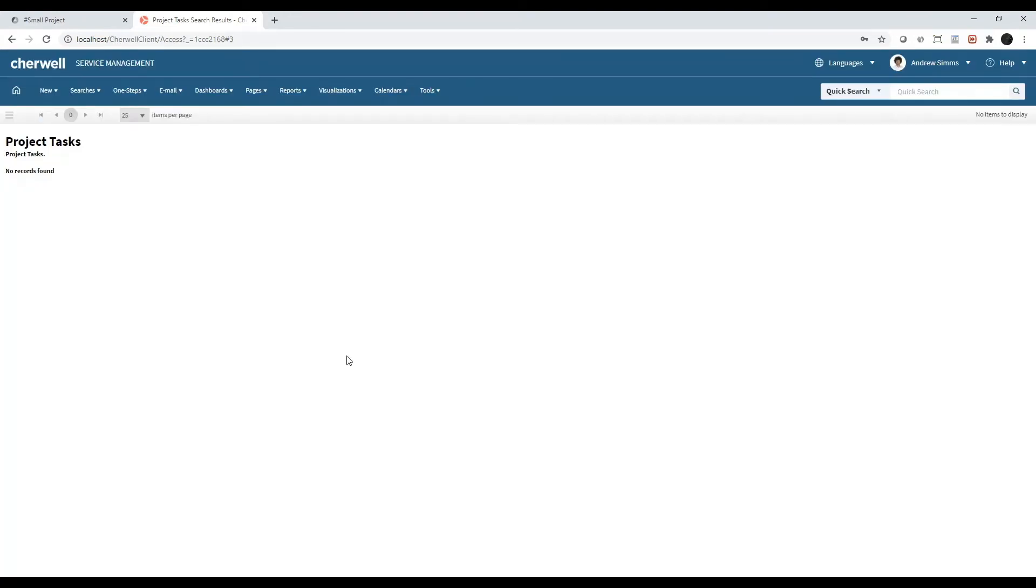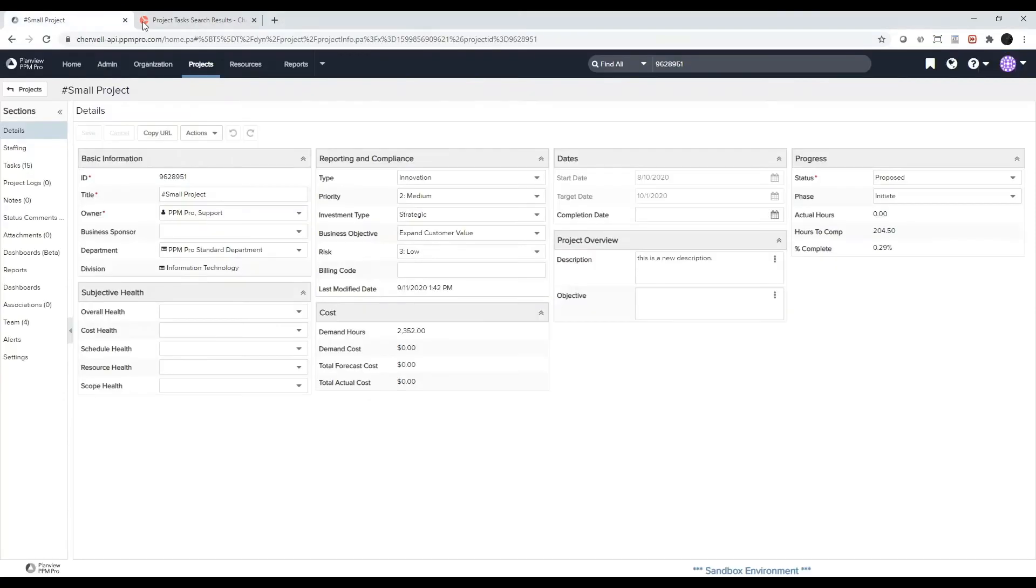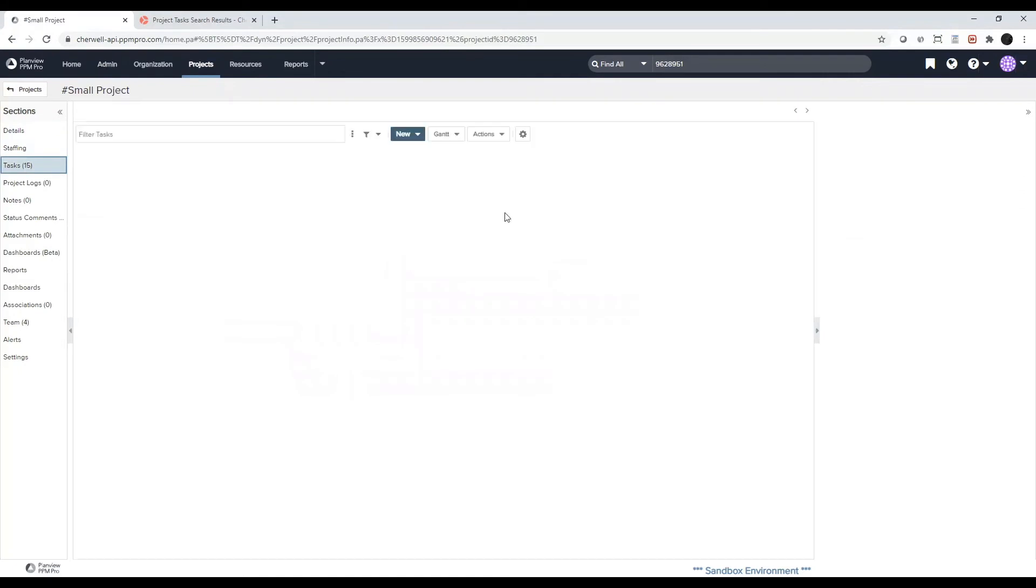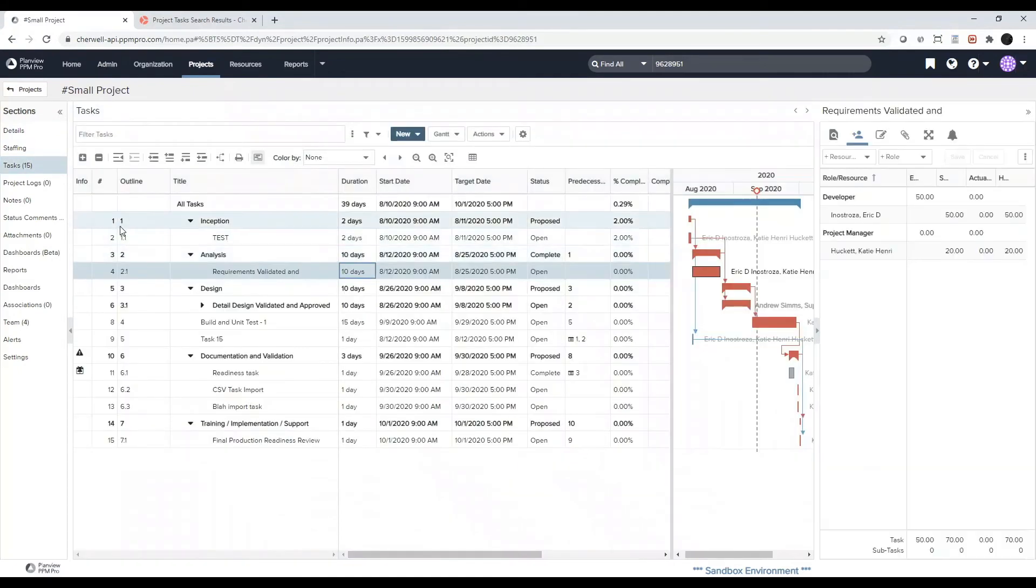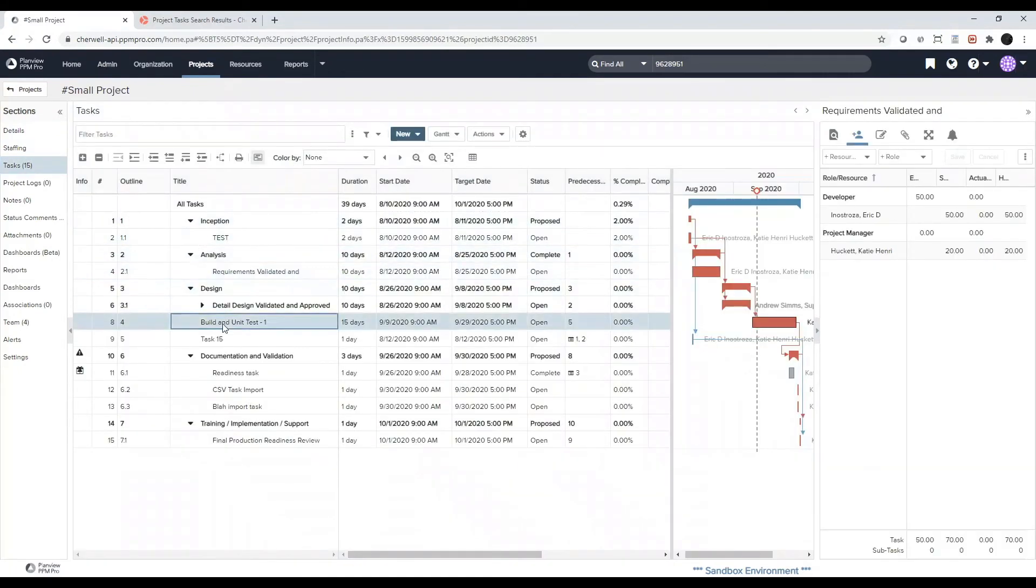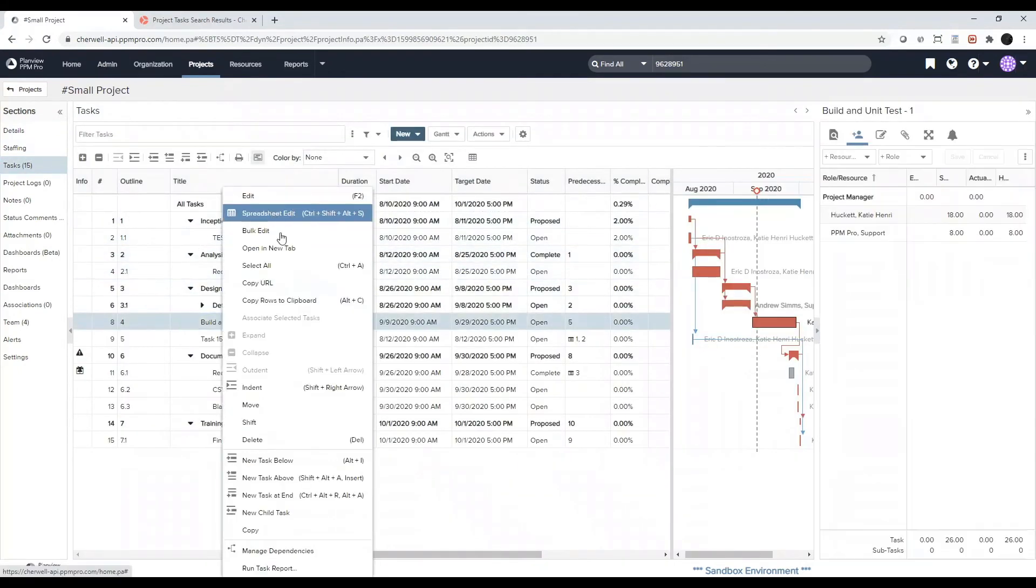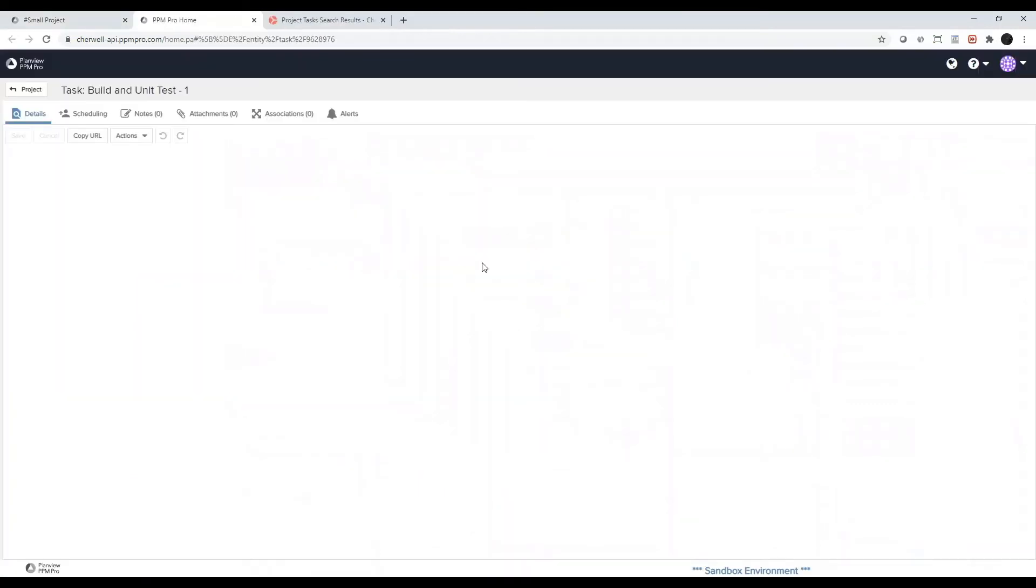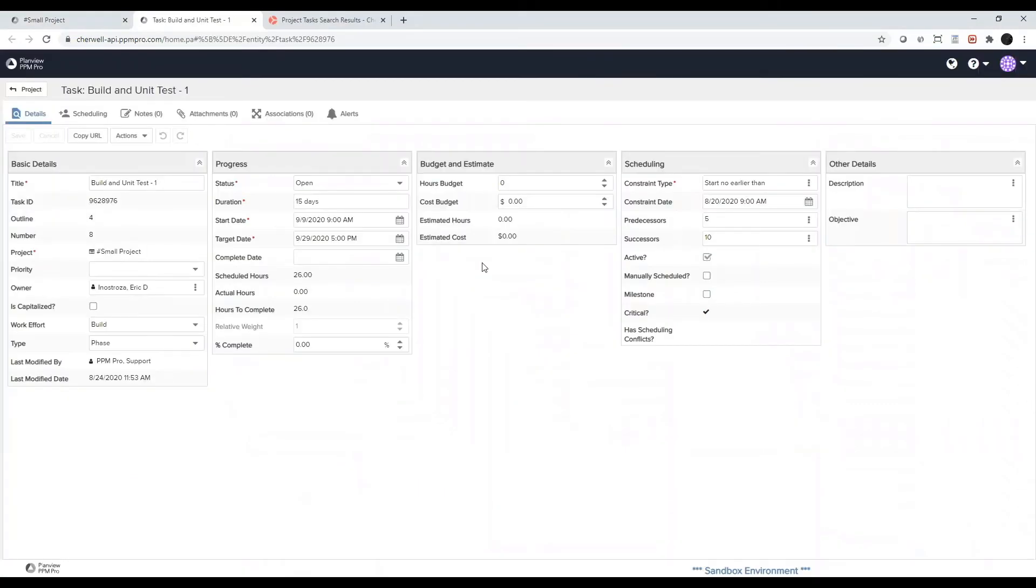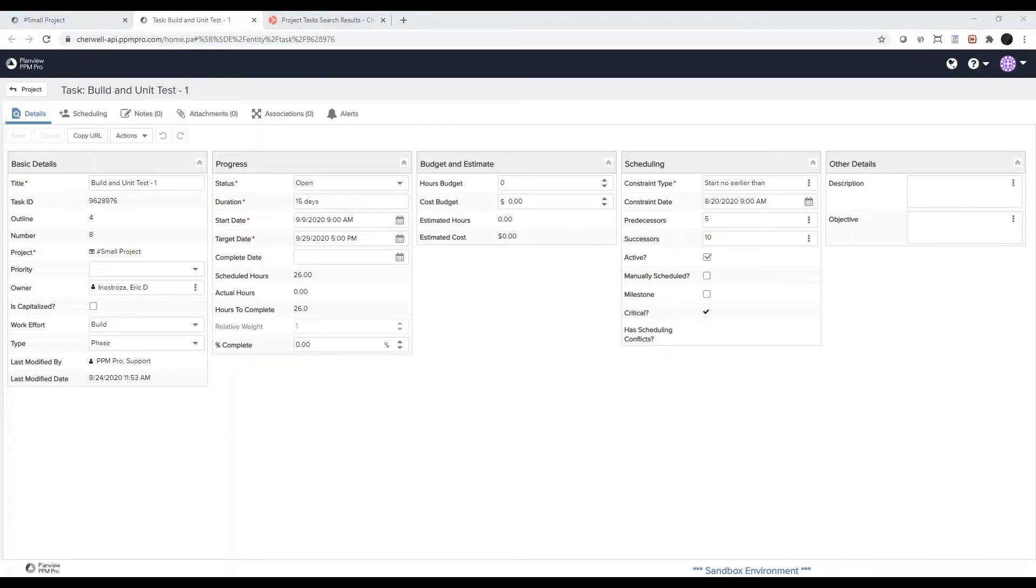There are other filters on this import process which include only tasks that have an owner in PlanVue who is also in the Cherwell user info table will be imported. If we look at a task here in PlanVue, the owner must also reside in the user info table in Cherwell. Also, the project must have resources scheduled to it and time associated.